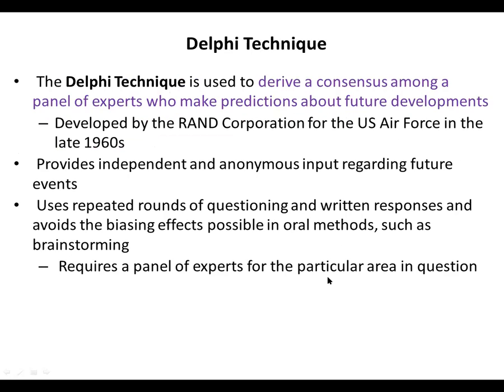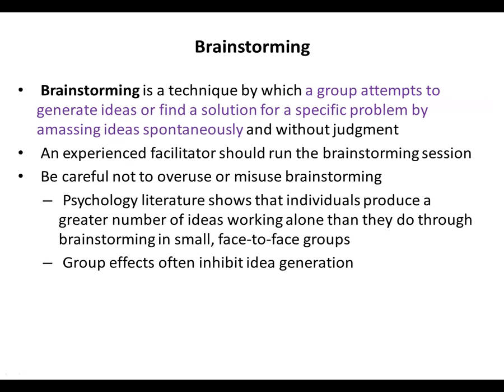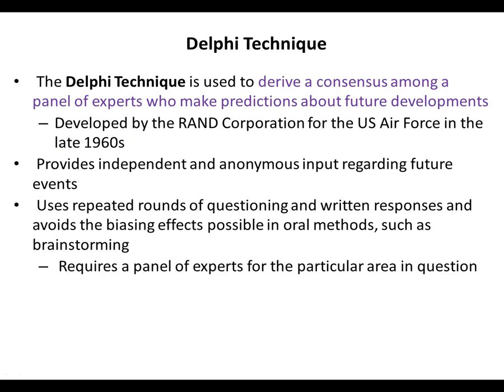When we compare brainstorming with Delphi, the main difference is that Delphi tries to derive a consensus among a panel of experts, while in brainstorming it's not like that. The people have different ideas, and we try to come to a solution using those ideas. Most of the time, the Delphi technique is preferred because we don't communicate orally, so less bias happens in the Delphi technique.